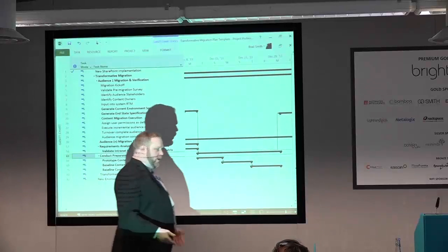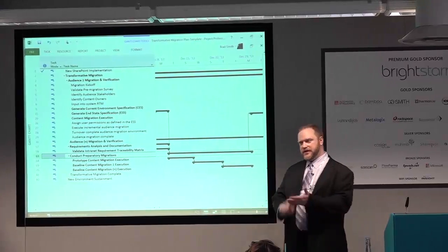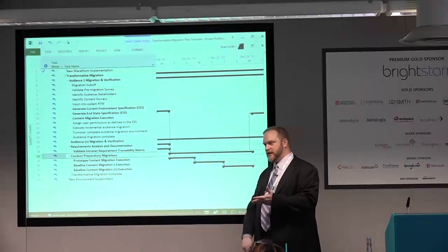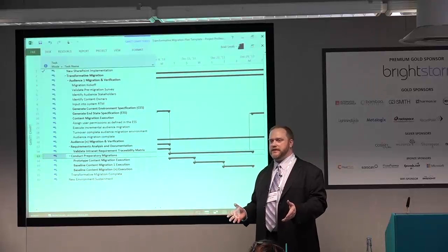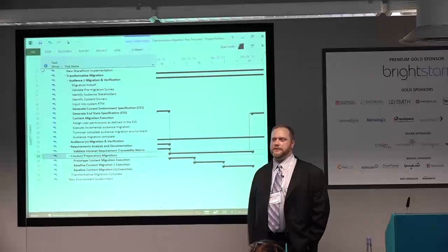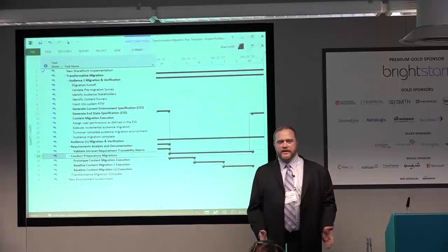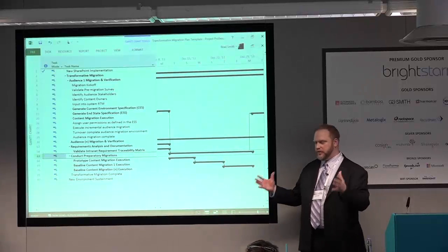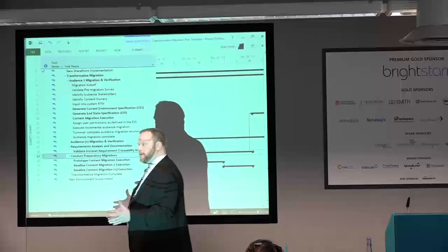And so for each component we were doing the structure updates. Each component had their own CES, each component had their own ESS, each component had their own incremental updates of baseline, each component had their own iterative content refreshes. And you manage it inside that space because SharePoint is a lovely product to be able to build those kinds of structural separations.